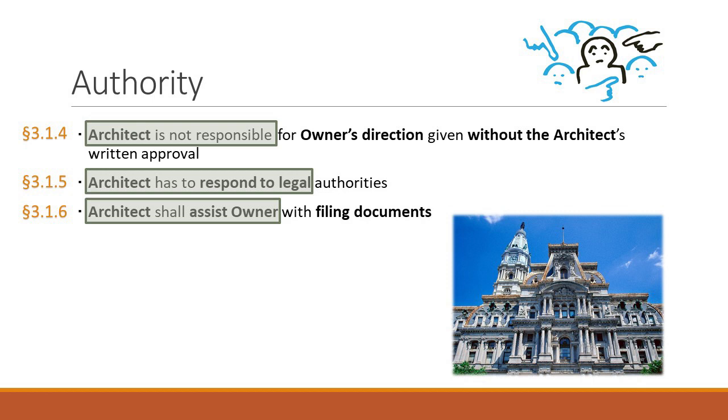So, I have a project going on right now up in Wisconsin, and they had the designs, they had dealt with the village, they had everything perfect, they thought it was good, and then they submitted the final designs, they signed the contract with the contractor, and lo and behold, the city came back and said, well, you need to do this with your soils, you need to do this with your footings, and there was a number of changes that the city wanted to have modified. Well, we looked to the architect and we said, you need to respond to these.